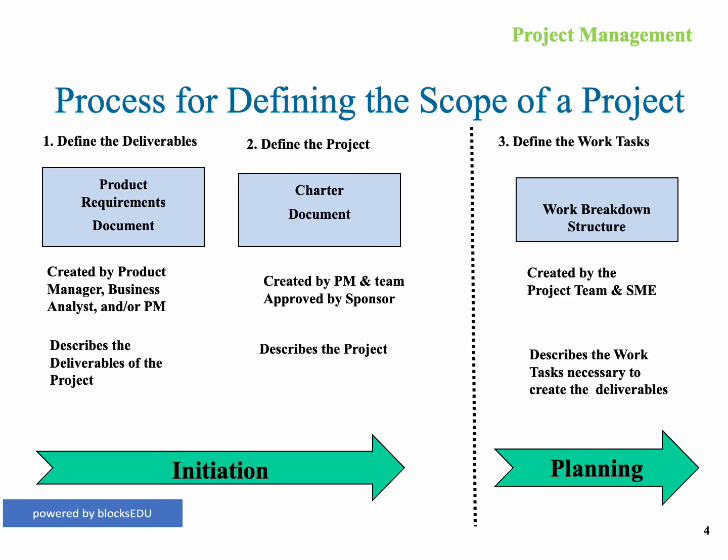And the second part of that is then the project charter document, which is basically a placeholder for all the things that have happened so far. The project team has created a project statement, priorities, some assumptions, things that they know about the project thus far, and they put that together, and that's the project charter. Those two things are the two major activities that take place during the initiation phase. The next phase, which is the planning phase, cannot start until those two things are actually completed and signed off and agreed to by your stakeholders and by your sponsor.